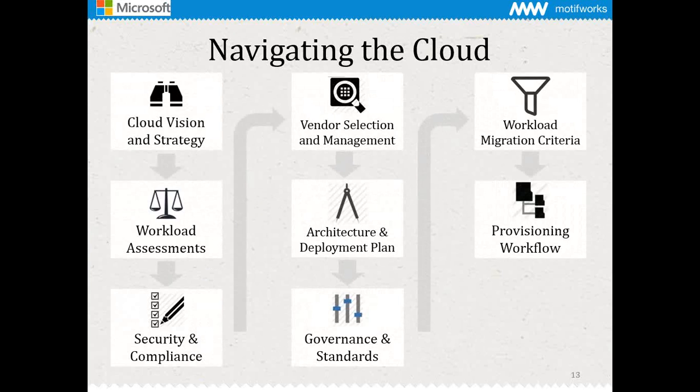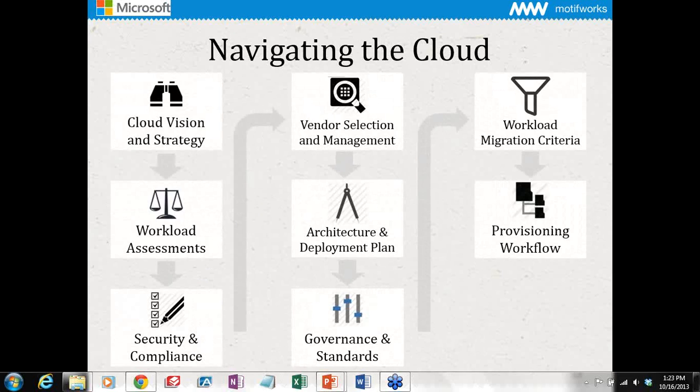Provisioning workflow. This is somewhat covered in governance, but I like to highlight it as a separate thing, because you need to understand how you are going to classify, group, and manage virtual machines and infrastructure. How are you going to roll out between different departments? Does each of your departments have a separate subscription, or are they using just one subscription for your organization? Because as you start moving more and more application infrastructure to the cloud, it starts to become big, and you need to understand the billing and all the different things. So definitely define the provisioning workflow well in advance.